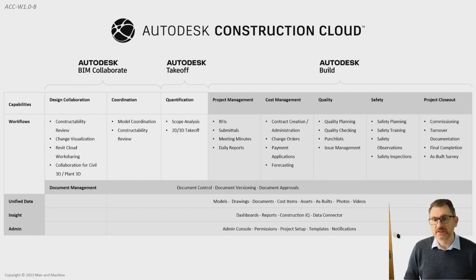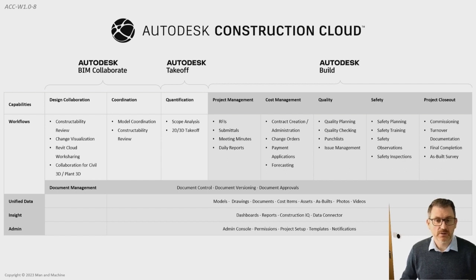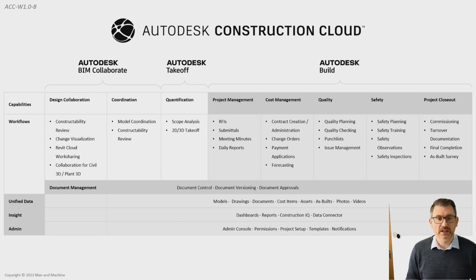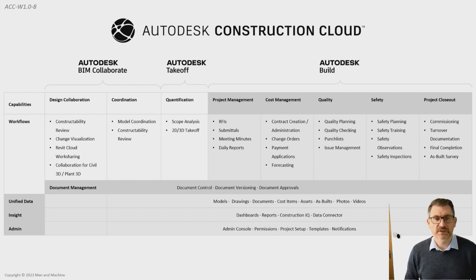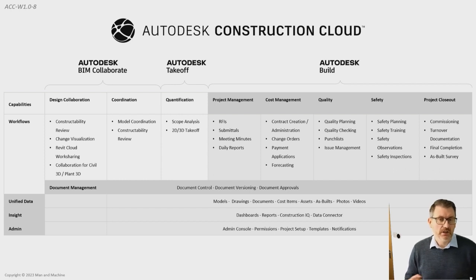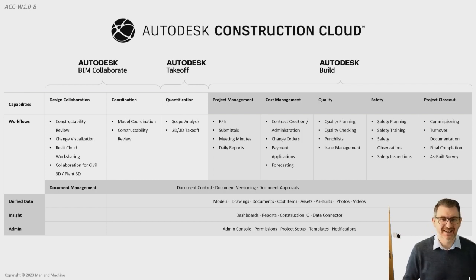Moving on to Takeoff — this is aimed at quantification. We're looking at 2D takeoffs for quantity surveyors and 3D takeoffs using our 3D models. We can utilise a model created in Revit and share it with the QS team so they can look at quantity takeoffs — for example, how many doors and windows are in an architecture model and what sizes they are. We can also look at 2D drawings for linear and area takeoffs. Because all information is stored in one environment, any changes can be updated appropriately.